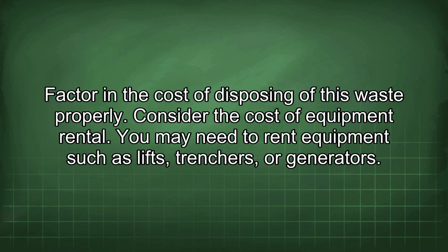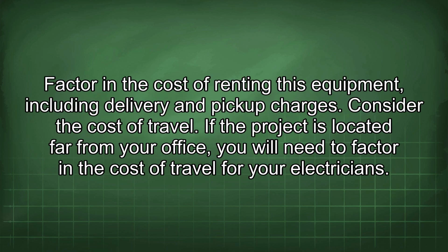Consider the cost of equipment rental. You may need to rent equipment such as lifts, trenchers, or generators. Factor in the cost of renting this equipment, including delivery and pickup charges. Consider the cost of travel.